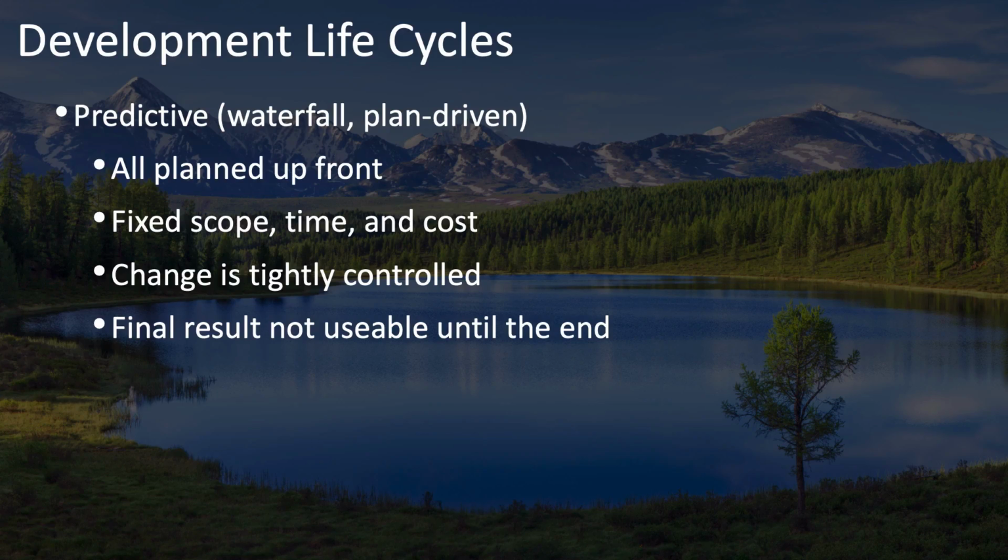And in this type of development life cycle, generally the final result is not really usable until you're completely done with the project. This is called the waterfall development life cycle because generally these phases are very separate. You've got a planning phase, a design phase, a build phase, a test phase, and then a transition or handover phase. In this approach, you do the work of each phase until that phase is done, and you don't start the next phase until you've completed the previous one, and you don't generally go back and revisit previous phases. When you're done with planning, you move on to design. When you're done with design, you wrap that up and you start building, and you don't go back and redesign.